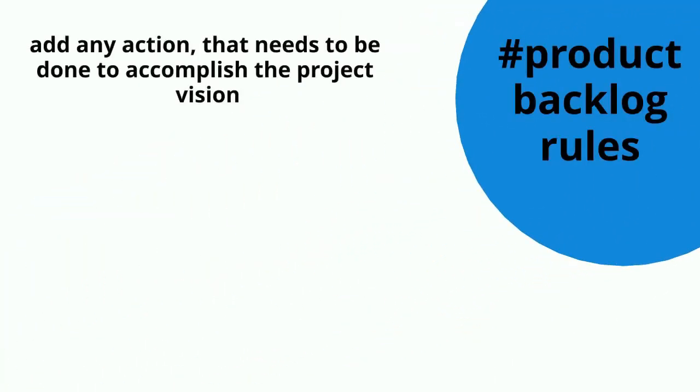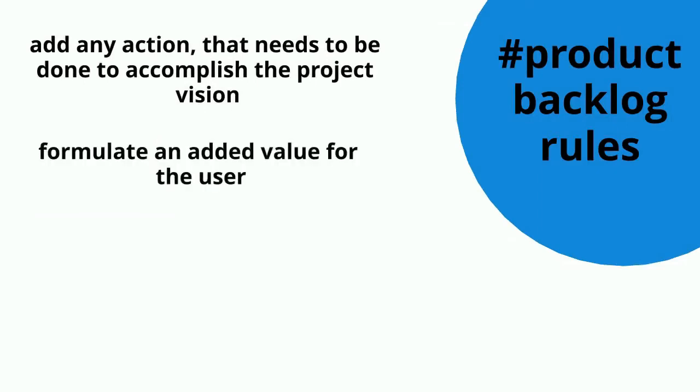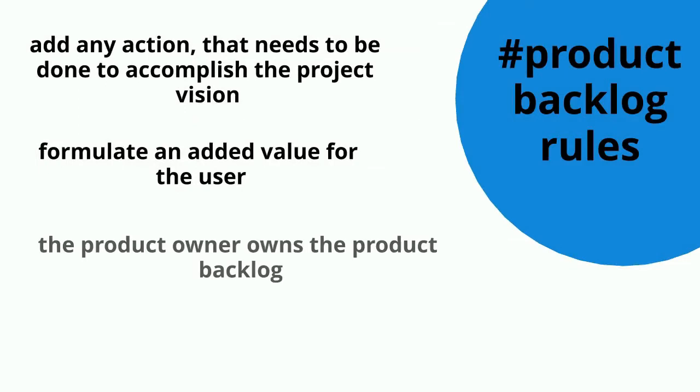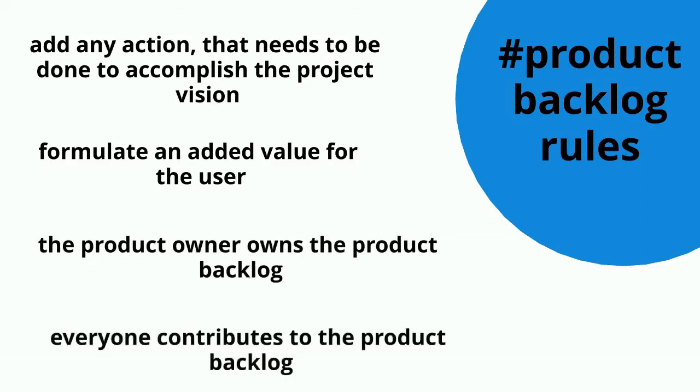What could we conclude as a product backlog rule so far? Add any action that needs to be done to accomplish the project vision. Formulate an added value for the user. The product owner owns the product backlog, and everyone contributes to the product backlog.